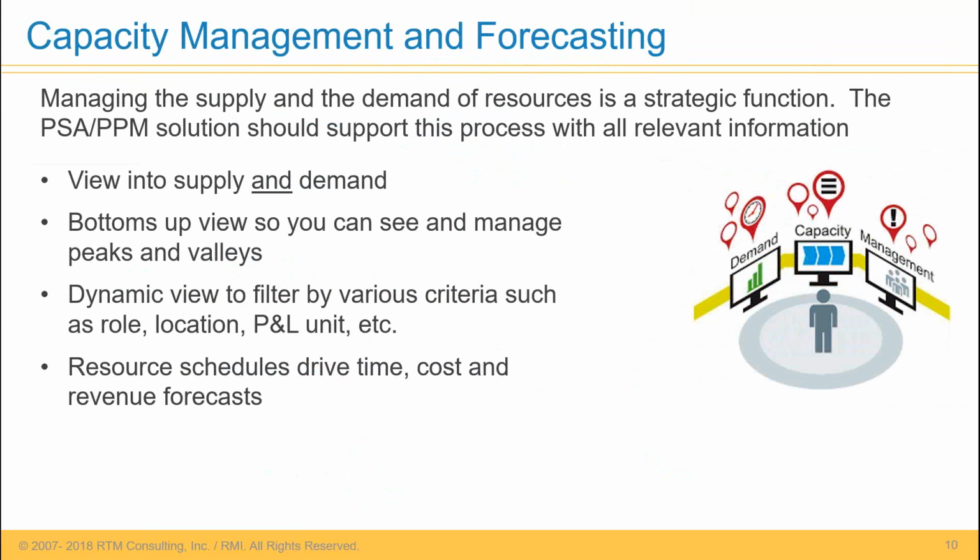And then the last point I'll say to wrap it up is that resource management is absolutely a critical function in the organization. It drives everything else. All the things that we talked about around staffing and the resource plans and staffing ahead of projects, they drive the resource forecasts, the cost forecast, and even the revenue forecast for PSA, for example for T&M projects. So it's important to have good resource management process and supporting tools. Otherwise, there's very little fidelity in the data and suboptimal decision making.